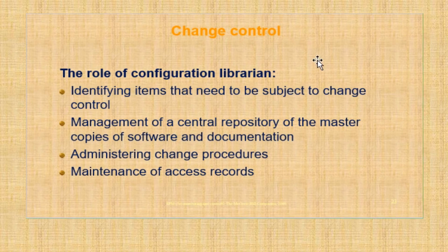So right now, how are we going to make that change? Let us discuss with these particular options. Identify the items. First of all, we identify what are the things that need to be changed right now. Then they need to be defined: how are these going to be reflected in my projects? The management has alternative views by which this change can be reflected, but they are not destroying whatever was available initially. This means they keep the original copy and may design an alternative copy of how the change is going to be reflected in your projects.